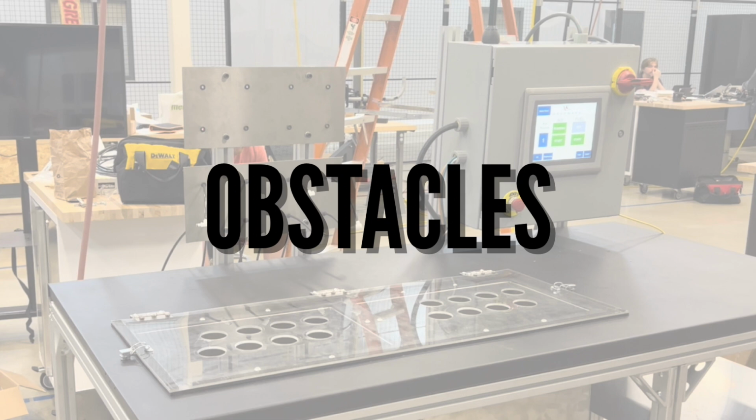I'm now going to talk about some of the obstacles we faced along the process of this build. The first of these is lead times, where a lot of the parts we ordered did not come in time or were back ordered, but the big hindrance is that we started ordering parts later than we originally intended, sending us back a couple weeks.